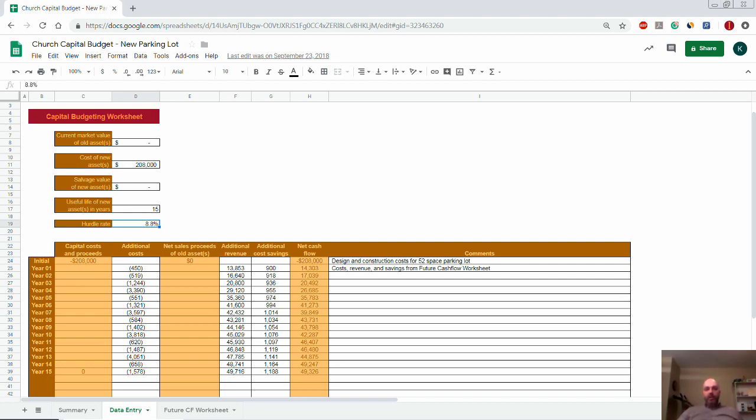And again, maybe you don't know what a hurdle rate is right offhand. Your hurdle rate. Okay. Same exercise. You probably don't have to start at 0 though with your low end of a hurdle rate, because think about, if your church particularly borrows money, what percentage rate do you borrow it at? You want to earn a return above and beyond what you borrow at, because then that allows your church to, if you do use leverage, borrow money, then to gain a benefit from that. So it's same sort of thing, same exercise. Start with a low end, like an absurdly low and absurdly high. Work your way from each direction, and then take an average and take a conservative, sway towards the conservative side, lower side of that, whatever.